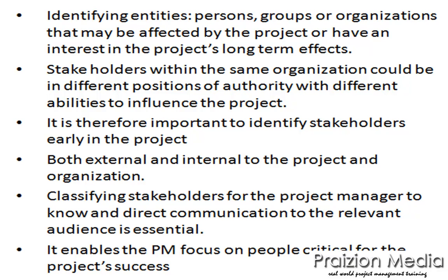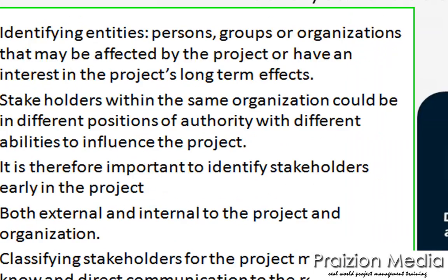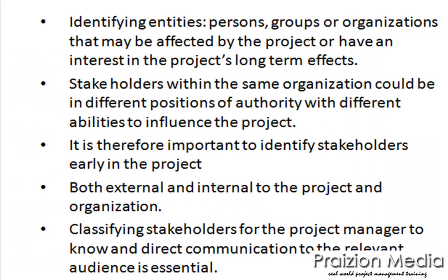Now, the following should be documented in the Identify Stakeholders process. You want a list of stakeholders, list of roles and responsibilities. You need to know the location of the stakeholders. You need to understand their requirements at a high level even before you begin to collect requirements, and you need to have their contact information. So at a high level, that is what you need to understand about the Identify Stakeholders process.